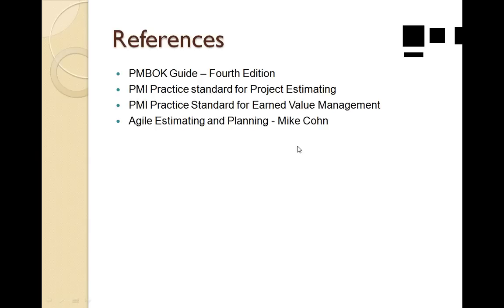And since we are talking about this, one more comment related to that is, it is not only related to the experience in the technology or in the domain, but we also need to consider the capacity of the individuals, because we might be estimating just based on the technical aspect, but we also need to factor in the availability of the team member for the project. If the person is available only for 10% of the project, then we will have to make sure that that particular availability is factored in when we are trying to estimate.